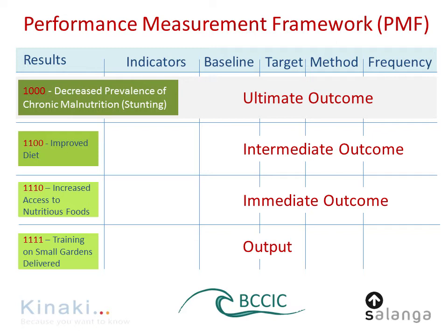What I think is really important is that at the intermediate level, we don't necessarily need to cover it fully within the scope of the project. We may significantly contribute. This really will depend on the scope of the project, on the type and the topic and the focus that you have. But at the output level and immediate level, it should be 100% in our control that we can actually achieve it.